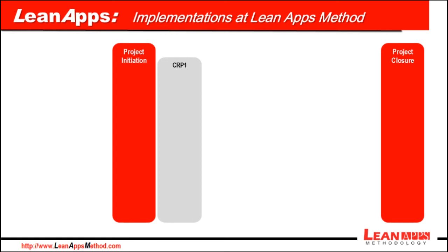The idea behind the business flows and the high-level apps architecture design is to help key users picture the overall solution before digging into details within the visual instance. CRP1 should not contain specific setups addressed to the client. It should be a fast phase in order to prioritize the approved gap list and to define setups. Test scripts also start being built in this phase.